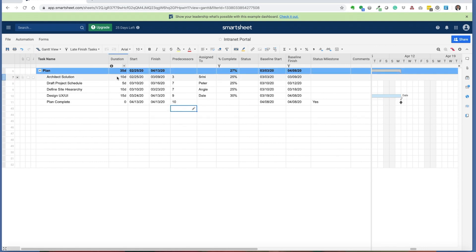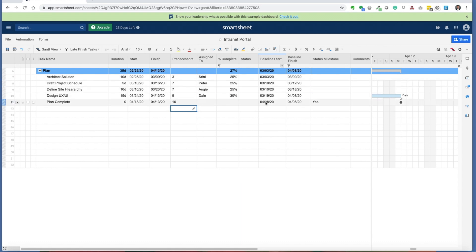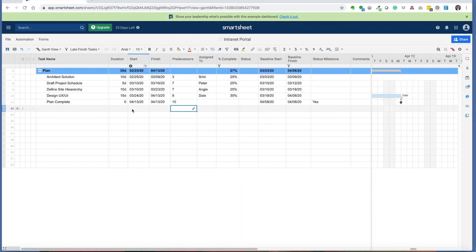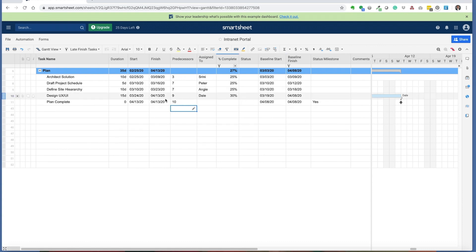Remember, your start and finish dates will always adjust. But the PM has to go back in and compare the dates against the baseline to see is it recoverable, and can you bring the project in on time based on the original baseline finish date.